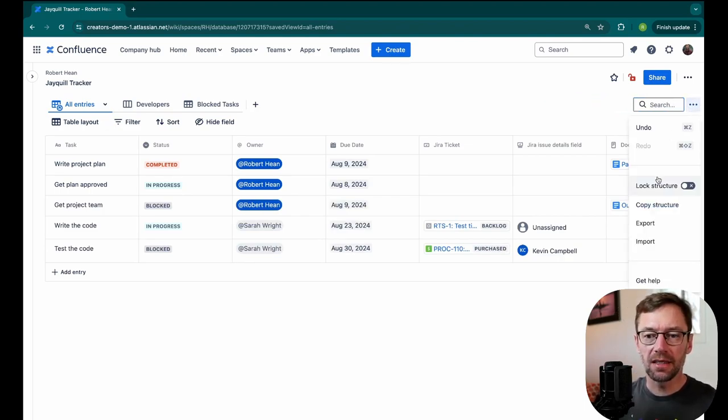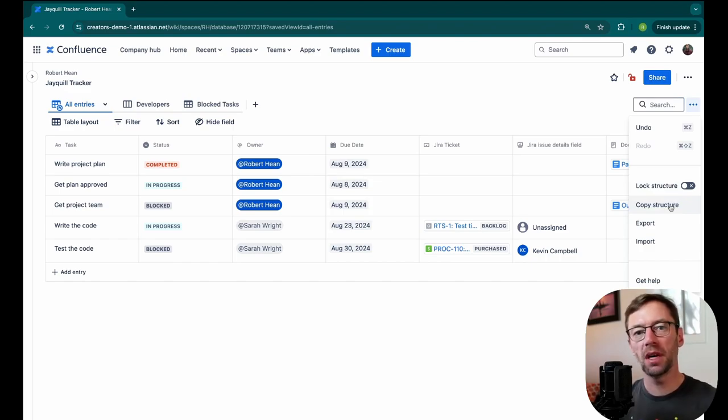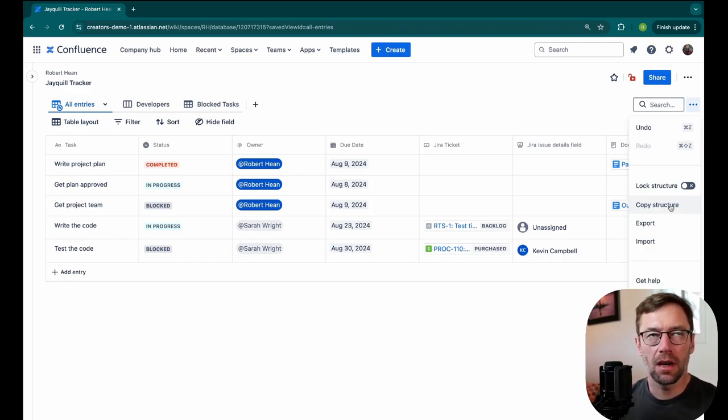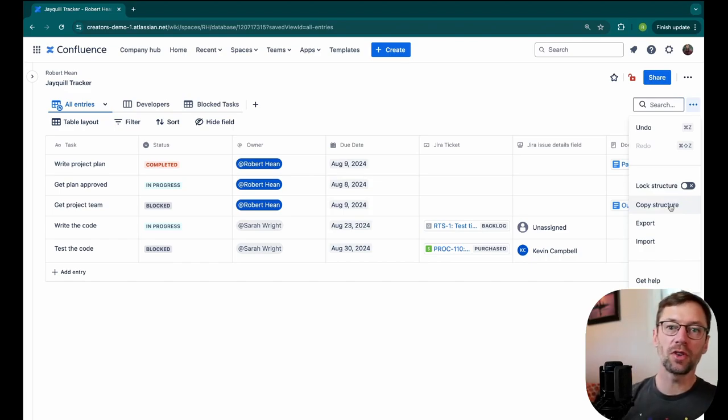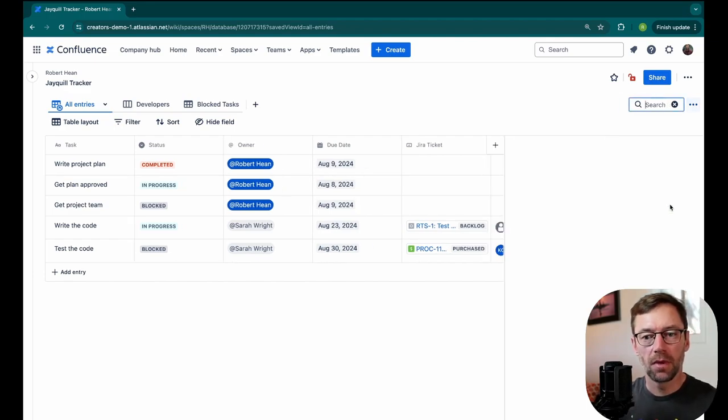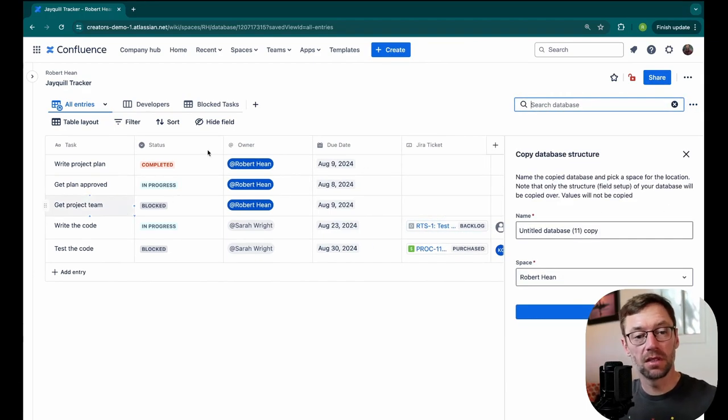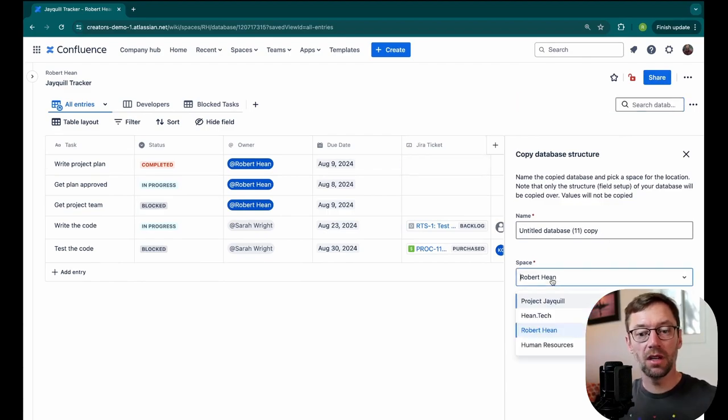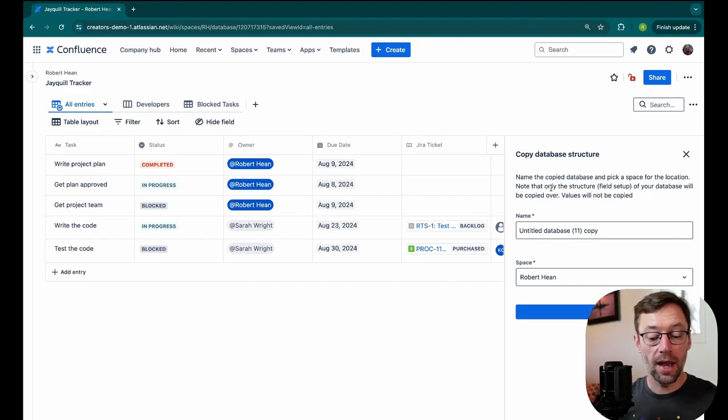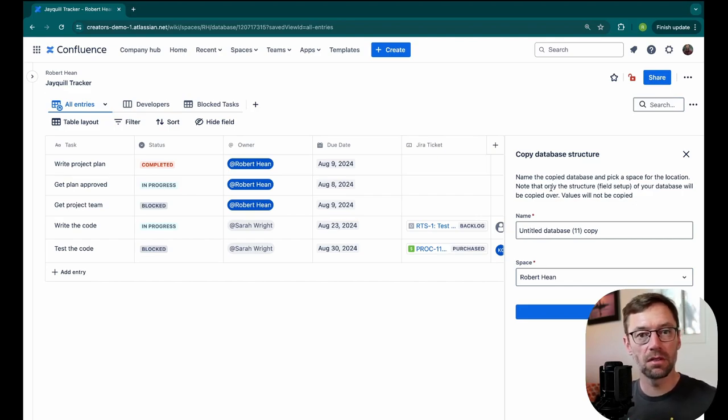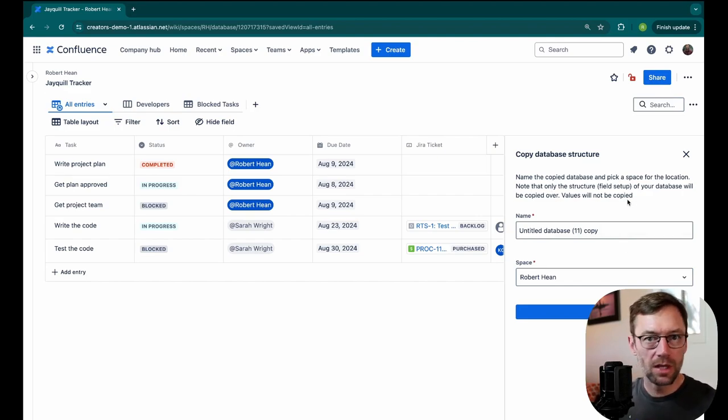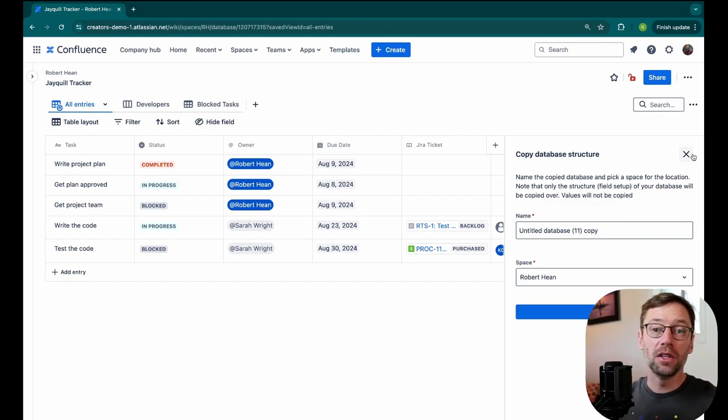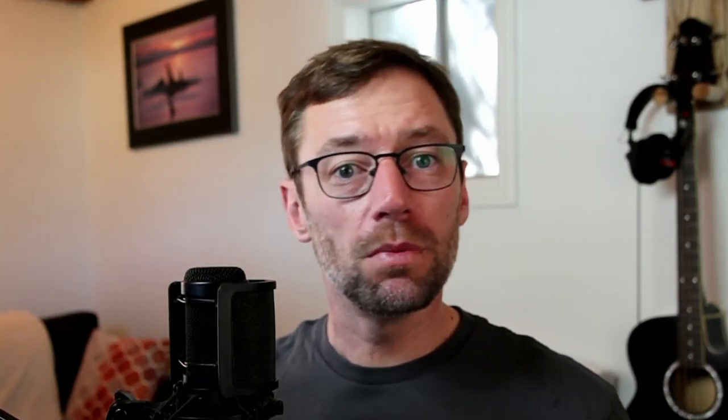Now if I go to this three dots, there is one great feature in here. If I have multiple projects, I don't want to have to copy and paste the whole database and then delete everything or build it from scratch. I can just click copy structure. This will take the structure, the columns and the settings, and put it in a new page for me. So as I spin up more projects, once I've figured out the structure I want, I can very easily just create a brand new blank database just like it, similar to a template. Another great way to speed up my life as a project manager, just by copying the structure.